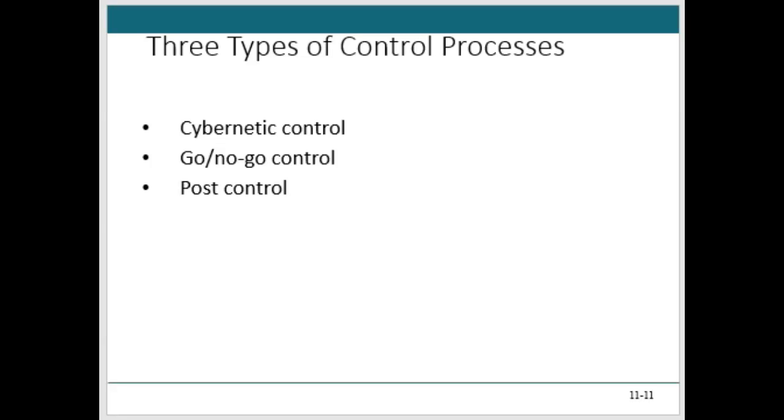Like, I want control of my finances, but I don't need everything in a $1 billion project to go to a change board, because there would be a lot of changes, right? I might have everything from $0 to $10,000 the project manager can decide and justify to the sponsor once a month in a summary report. Maybe anything from $10,000 to $100,000 I have to present to the sponsor, but they could approve.